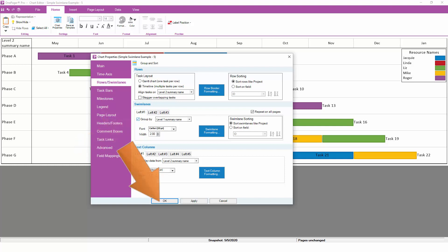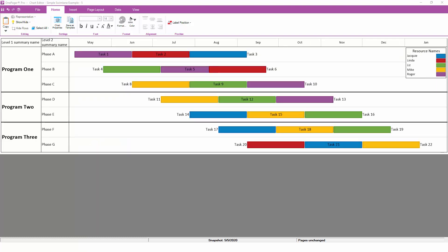Once that's complete, click OK, and you'll see that the first swimlane has three rows, while the second and third swimlanes each have two rows. Any field from your project plan can be used for swimlanes, so if you prefer to group and sort based on something other than your parent tasks, you certainly can. Other popular choices include resource assignments, department or functional area, product category, or subproject in the case of multiproject or portfolio reports.